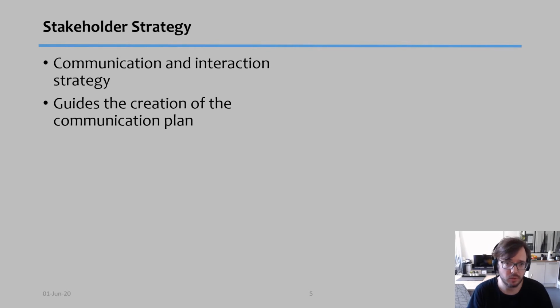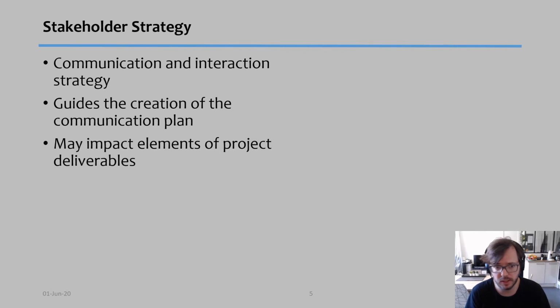And how do you manage a relationship? Through the content of the information you provide and through the frequency of that information. And after this analysis, you might realize that some deliverables of your project might actually be changed based on who the stakeholders are.